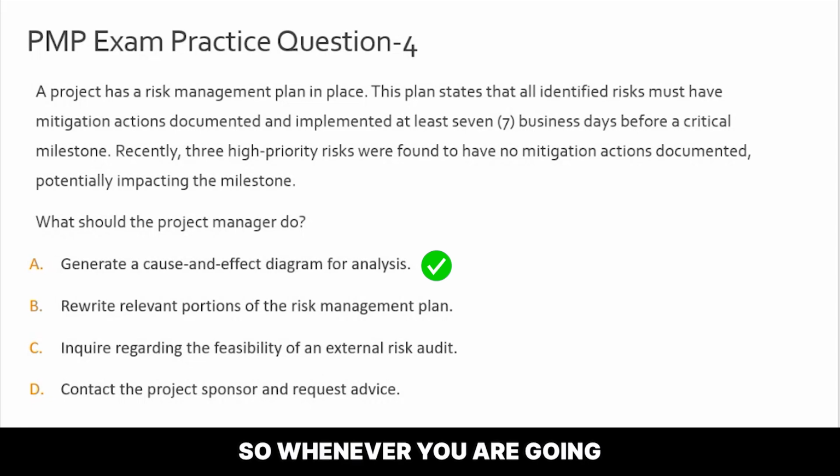Okay, so whenever you are going to your sponsor, always go with the problem statement and then your analysis and then your recommendation, and then it will be like a healthy discussion with your project sponsor, and that is the last resort in terms of the types of answer options which the PMP exam generally presents to you. Okay, so please keep that in mind. So the correct answer to this question is option A.